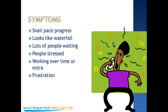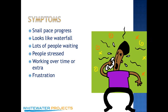Bill Ward came up with the INVEST model a number of years ago, and everyone uses it to define what a good story looks like. Maybe I should do a webinar on writing good story cards — let me know if you'd like to see that. One of the best things you can do is story time. Story time is where you take a block of time — probably an hour in the morning every day — and take a story from your backlog and discuss it as a team. I prefer to see it every day because then it's got a rhythm to it.